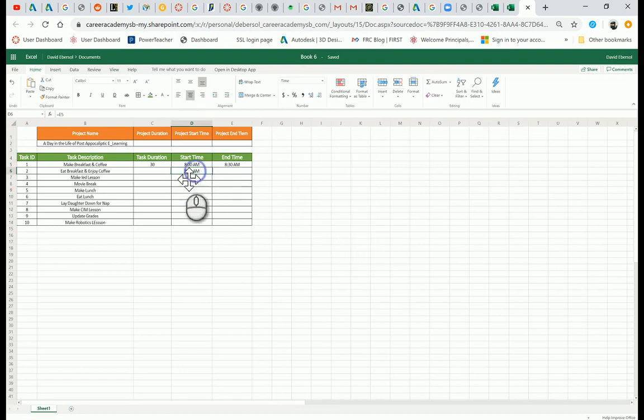I can't start at 8:30, right? No, because I need to be able to end after this. So I'm going to go ahead and say it's really this plus 15 minutes. Because I can't start the next thing until the first thing is over. Boom. Oh, what did I do wrong? Oh, no extra comma. Boom.